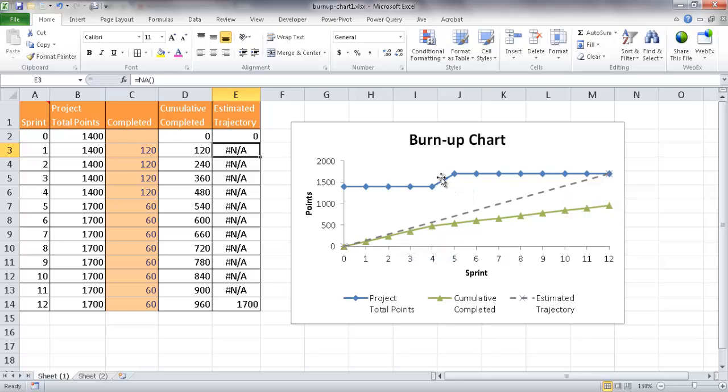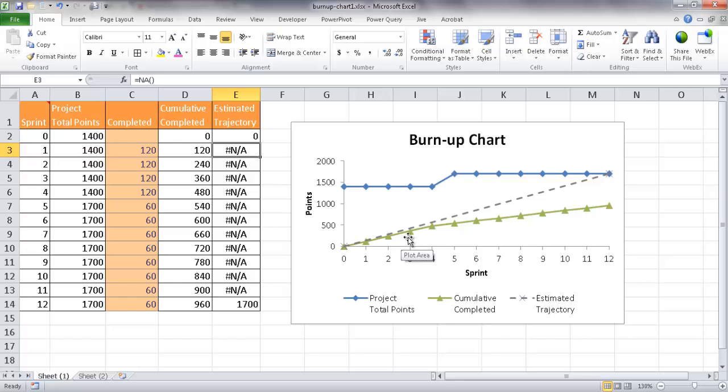But these two other lines, this is basically our target. When you really think about it, our total points is our target. And we have our actuals, which is cumulative completed.